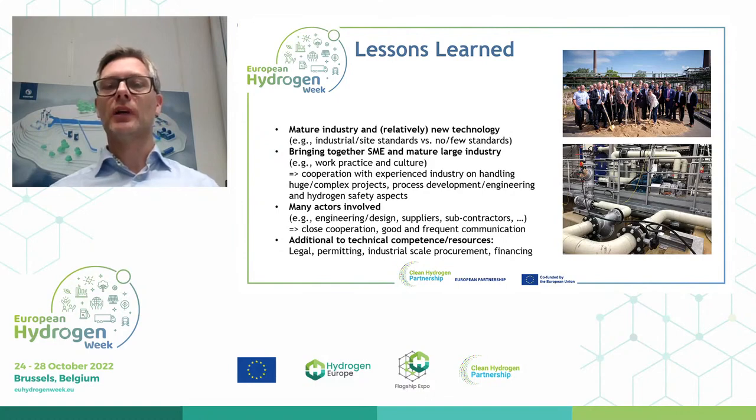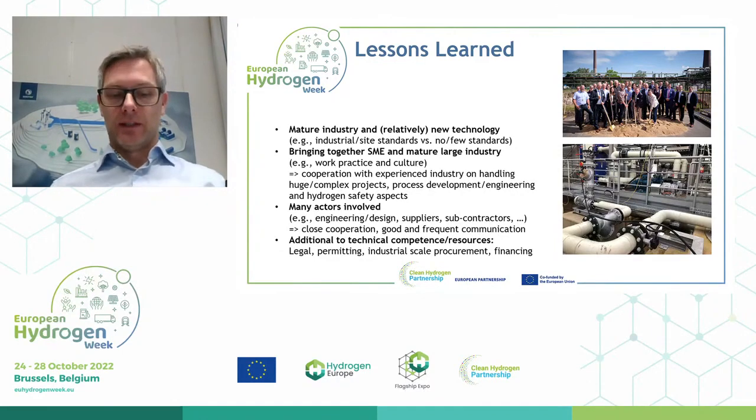As I said, impressed by the two actors on how they have been able to realize such a project and a plant. There have been many actors involved. You have everything from the engineering, design, supplier, subcontractors, and then of course, at the end, those who are going to operate the plant at the site. This also relates to additional competence required during such a process, which sometimes is a bit outside of the smaller scale activities when it comes to the legal side, permitting, industrial scale procurement of both components, electricity and all that, much which is outside of many of the actors' knowledge in this area. Next slide, please.